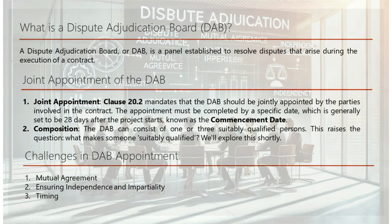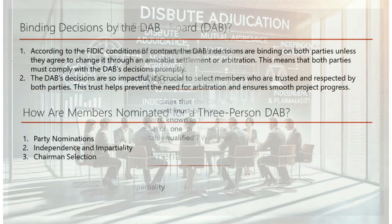Several challenges can arise during the DAB appointment process. First, achieving consensus on DAB members can be tough. Second, ensuring nominated members are free from biases. Third, timing — delays can occur, especially if the DAB is not established early. Open communication and a clear understanding of the criteria for DAB members are essential to overcoming these challenges.